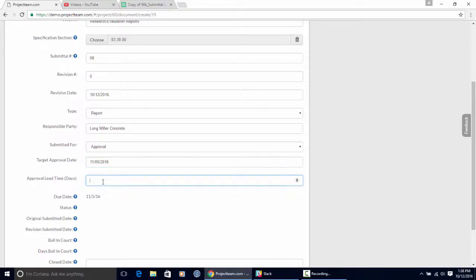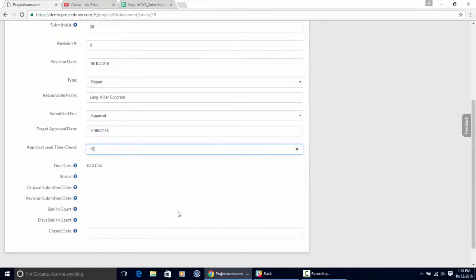I'm also going to say that it takes about 15 days on average for a submittal to get approved. That gives me a due date of 10/21/2016. So that means I want this submittal submitted to me by 10/21. It usually takes about 15 days for it to get approved, and then I should be able to hit my approval date of 11/5. The rest of these fields down here are all going to come from the submittal workflow.